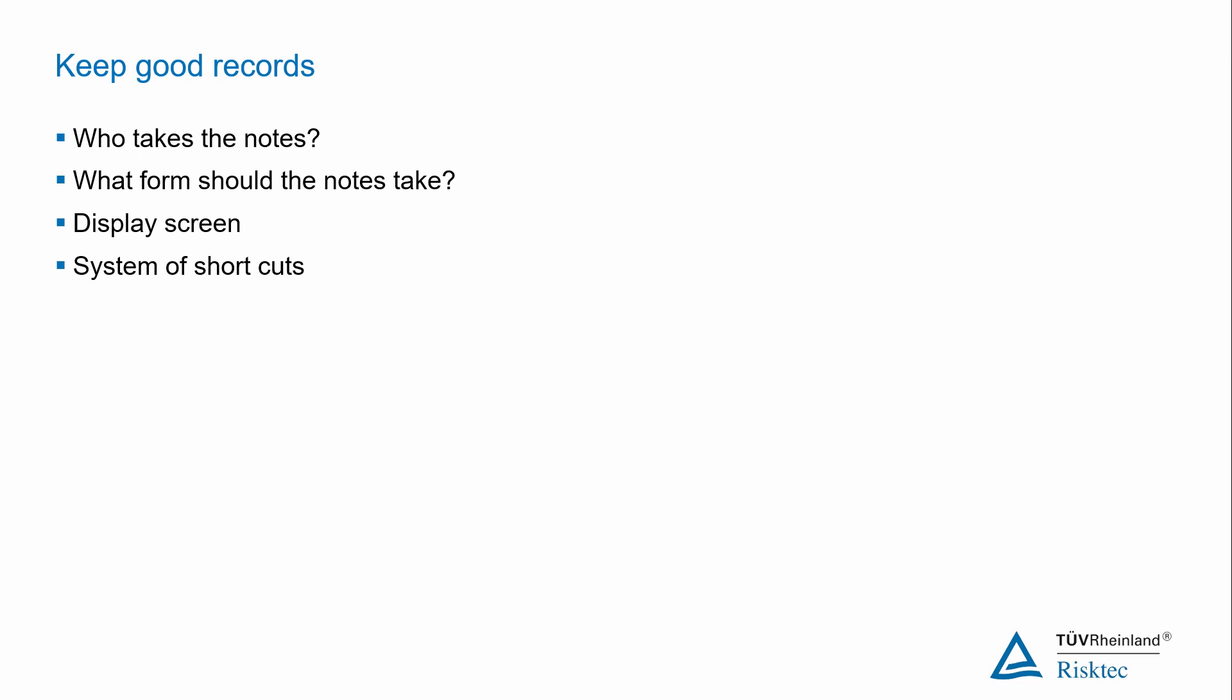It is also a good idea to have a system in place for items where you need to go back and tidy up after the workshop to save time during the workshop itself. For example if you discuss a point and decide it is essentially the same as one discussed earlier you can just record in the notes, see earlier, copy discussions from there to here. Using capital letters or an asterisk or similar each time you make such an instruction to yourself makes life much easier when you are tidying up the notes later. You can just scroll through the notes and easily identify all of the locations where you need to do some copying and tidying up.